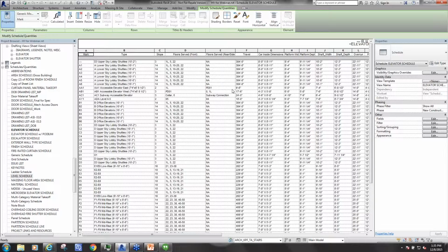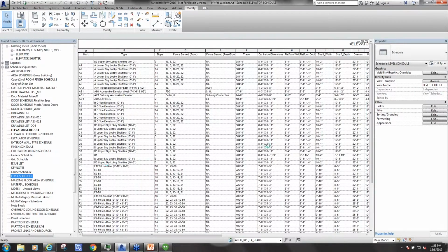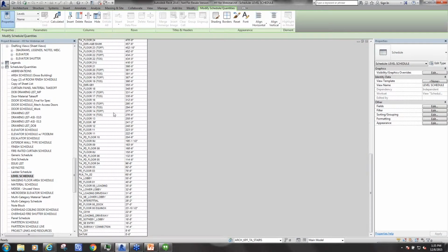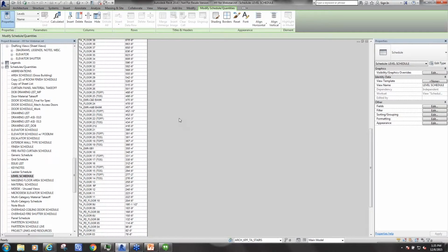That could very quickly be done by one person, which of course saved a ton of time, a ton of money, a ton of headache, and also made any design changes much easier, especially in the restack. Say 5 levels get taken out and your program changes, and what used to be a sky lobby is no longer a sky lobby, so the area of usage of those sky lobby elevators needs to change. Instead of a whole team tackling this graphically, we're down to one, maybe two people being able to get this done in less than a day.